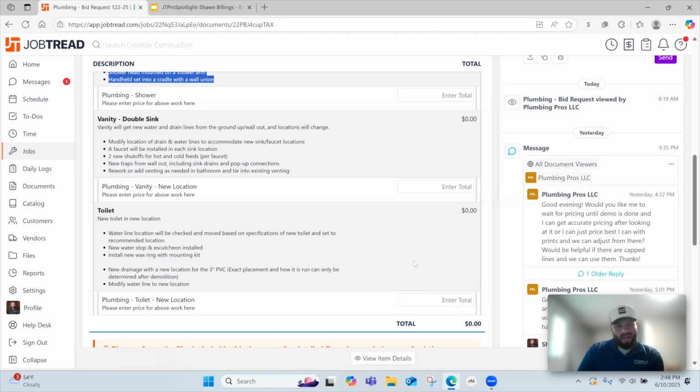But bid requests don't matter anyway in that sense. It's not actually going to affect your budget or do anything unless you take this bid request and then make it into a purchase order. Once you make it into a purchase order, then it's tying numbers to the item. But this is your setup for that. Hopefully that answered the question correctly. Yeah, I think that's good. I think those bid requests look great, as a matter of fact.